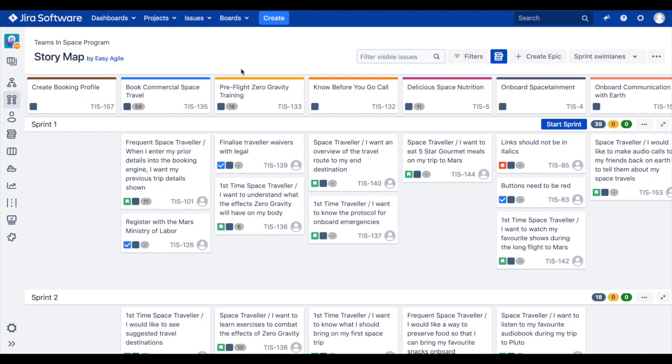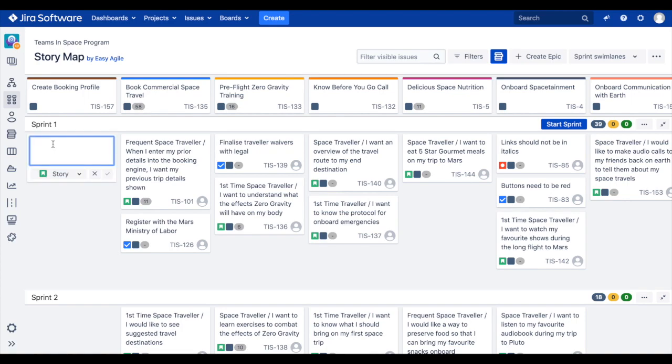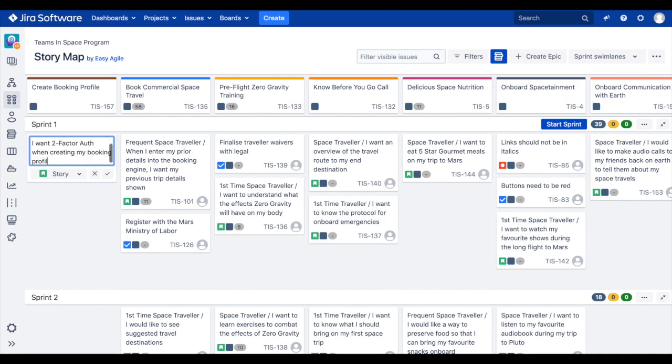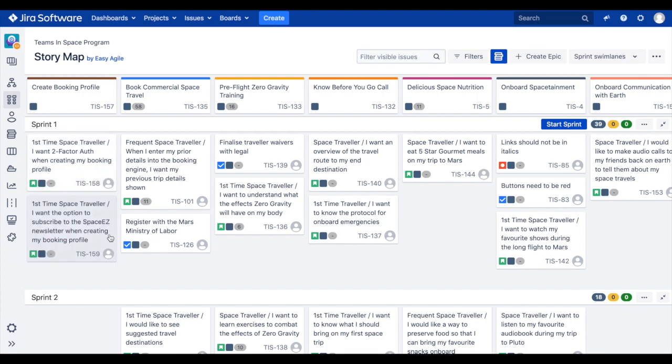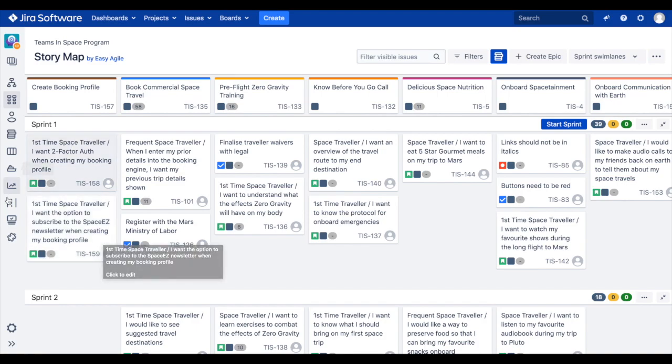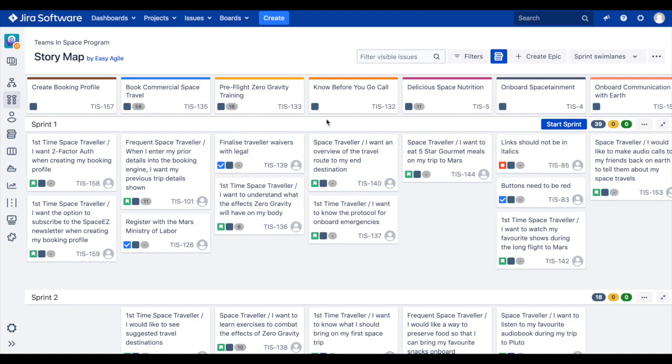To create a new issue on your user story map, hover over any blank space under your chosen epic and click add new. Clicking new will open the following quick create box. Simply inline edit the story summary and hit enter to continue quickly creating new stories beneath your chosen epic. Your newly created stories will now automatically have their epic link set in JIRA and will also be scheduled in a sprint or version swim lane that they were created in.